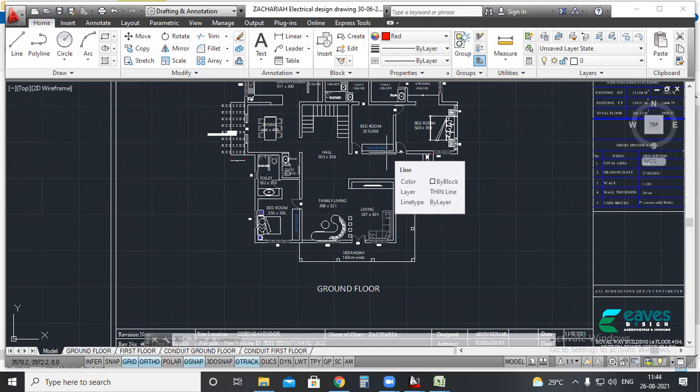The main important point is that from the distribution board to the energy meter, the conduit is necessary, because from the energy meter you need to pull the main cable or main lines to the distribution board. If you forget to lay the conduits, in future or after completion you have to do more civil works to pull the main conduit. So before plastering, if you can finalize the location for the energy meter and DB, then you can lay down the conduits.